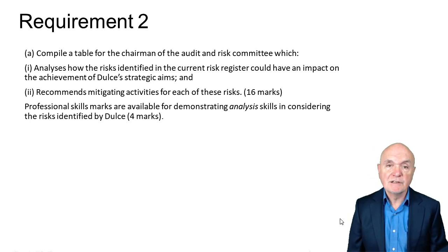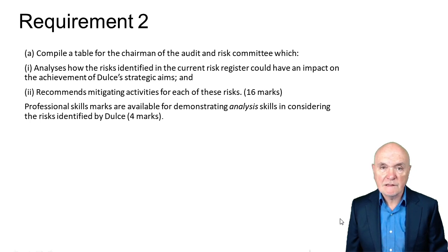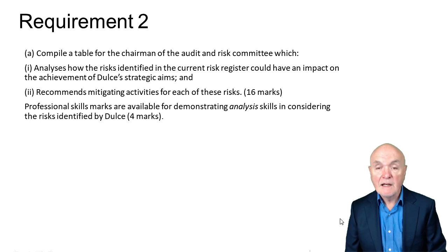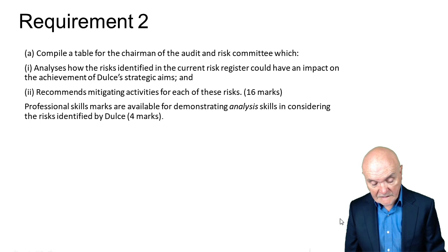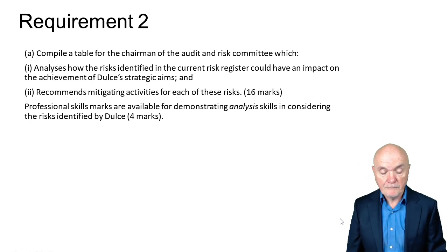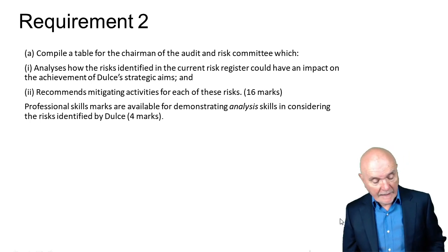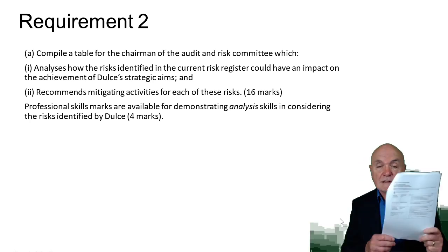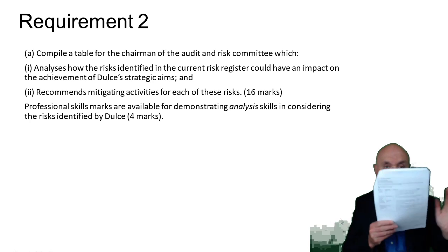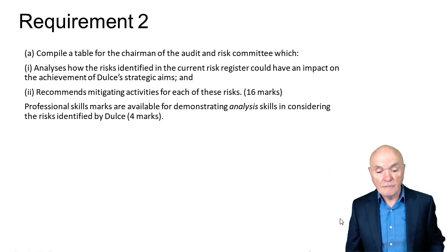The manager who's in charge of dealing with this risk, for example, keeping it under review, thinking of mitigating factors, a much fuller description of the risk, and then a rating of the risk here, whether it's high or medium. And it's set out in, I suppose, what I would call typical risk register form, going across the page in the form of a table.